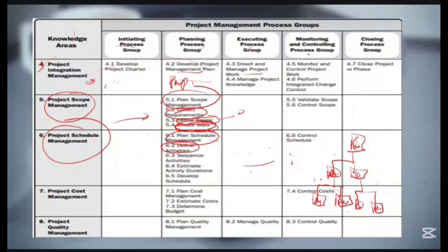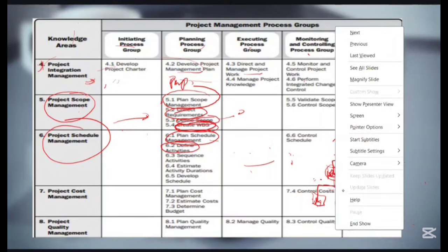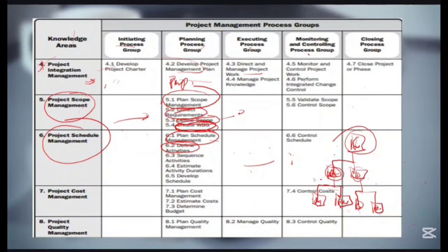All right. So if you want to finish the book, we do the subtopics. If you do subtopic A1, A2, you achieve topic A. If you do subtopic B1, B2, you achieve topic B. And once you have topic A and B, you have the chapter. You get it? So you do the lowest level. You don't do the chapter. You do these ones to achieve it. That is what we term as work breakdown structure. And it will define the scope for you, and we'll create the scope baseline for you.